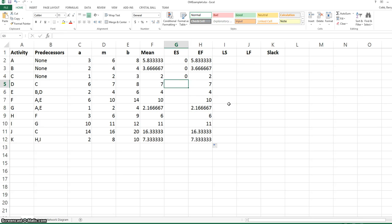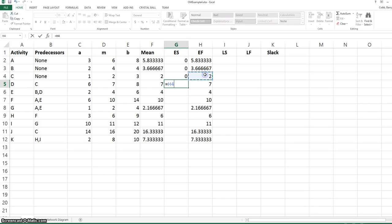Now we need to make the forward pass through the network. Logically, if activity D has C as a predecessor, the earliest that D can start would be the latest that C can finish. We set this relationship up with a cell reference in Excel.